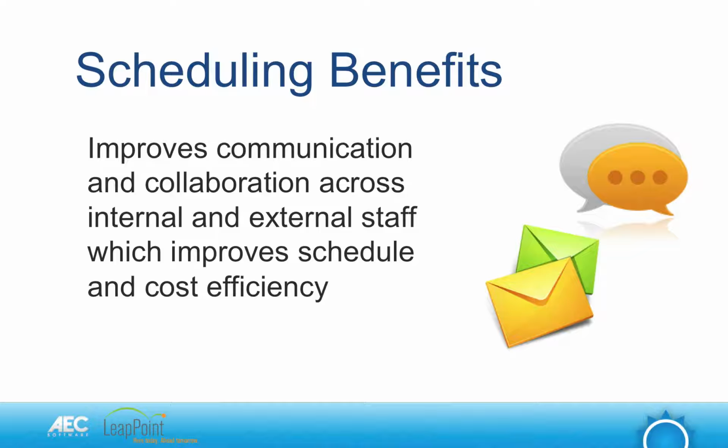In one instance, if a subcontractor is falling behind, you wouldn't want the other subcontractor to appear on site until they're complete. Well, I've seen lots of examples on construction sites where there are subcontractors that are on the site because they were anticipating to be there and start their work. However, earlier delays have kept them from beginning. That causes you schedule delays and cost overruns. So by effectively managing your schedule and looking at the dependencies, you can effectively communicate and collaborate and tell that subcontractor that there are delays and that you'll have to push back, hopefully improving your efficiency across both schedule and cost.